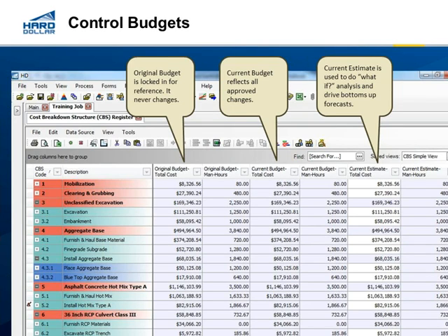You have that ability. And at the end of the day, when you're getting that final payment, well, here's a new audit log of everything that has been changed on your estimate. Here's what you originally approved for, and here's all the changes, and here's all the documentation. Here's excavation changed. Here's what it originally was. This is what it actually was. Here's my change request for $50,000, and this is why you should give it to me.